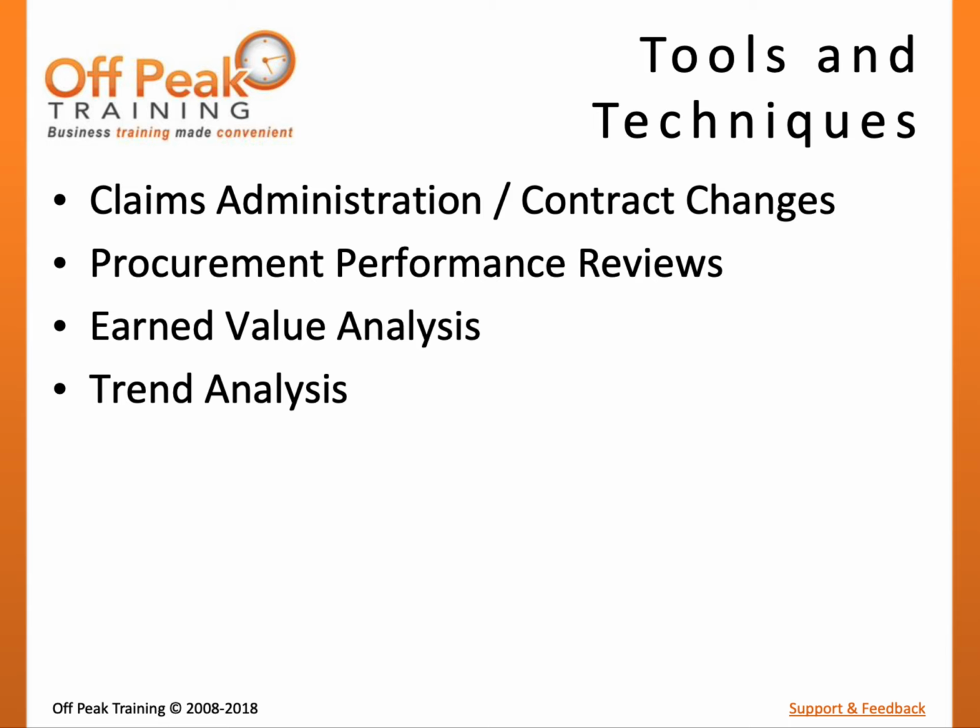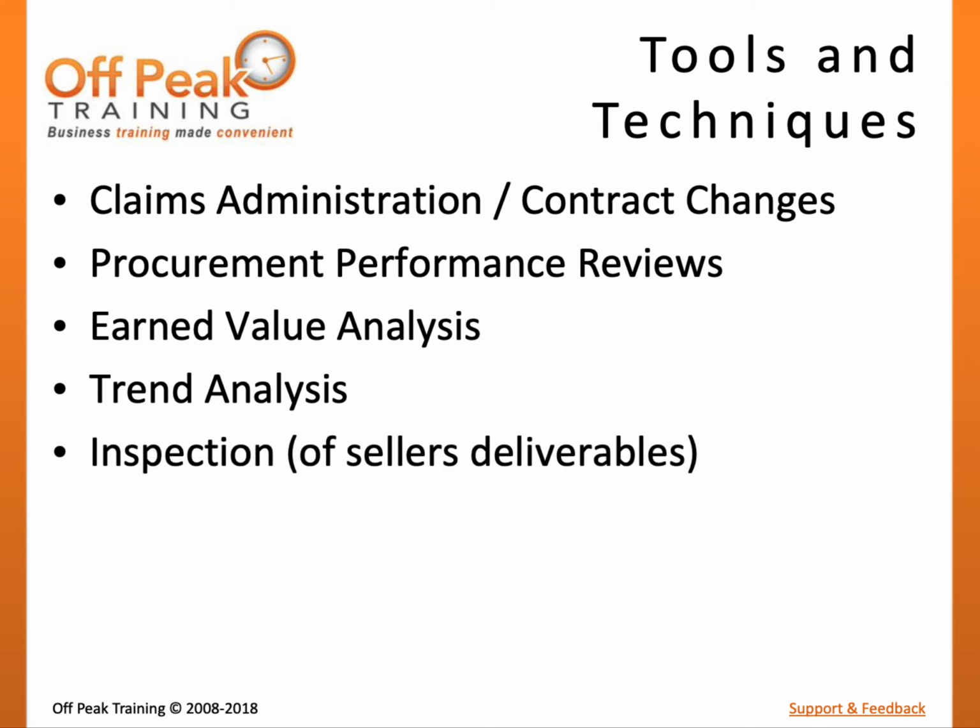In both cases, the buyer will be evaluating the seller with respect to compliance with the agreements and the influence it will have on their own project performance. The buyer will also perform inspections on the seller's delivery of products or services. In order to ensure buyer requirements are met, agreements should have measurable criteria to evaluate conformance.